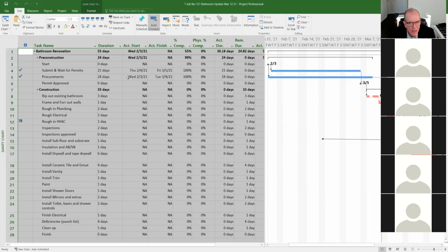It selects everything. That way I don't have to worry about missing anything. And then I'm going to just click on mark on track. See that mark on track? And then it just fills in all the rest of the dates for me. That's why I said I usually fill in all the oddball ones, the drivers that push everything. Then I look at it, what's left. I'm good with those dates. And then I just select mark on track once I've selected everything.